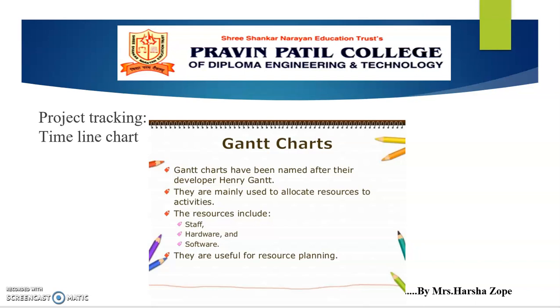There are some activities conducted during tracking of the project. First, conduct periodic meetings and then evaluate the results of the project reviews. Then compare the actual start date and scheduled start date of the project tasks. Determine if the milestones of the project are achieved on the scheduled date. Then meet informally with the software practitioners. Then assess the progress of the project quantitatively.